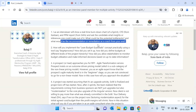You need the real-time capability to analyze a burndown chart, analyze a cumulative flow diagram, and come up with recommendations or remediation. Regarding the program predictability measure (PPM) report: a PPM report tells you at a program level — typically at an agile release train level — what is the commitment reliability or program-level predictability. I suggest you take a real-time PPM report from your own project or from someone working on SAFe, visualize it, pull out inferences from it, and build real capability rather than reading theoretical pages.